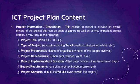Then, project proponents — usually just the school. Project beneficiaries — who do you want to help: the urban poor, women, youth, students, out-of-school youth, etc. Date of implementation and duration — probably the entire second semester of this school year. Budget requirement — include this even if it seems like just a subject project, because using the internet, electricity, and your gadgets already constitutes a budget requirement. Project contacts — if you have contacts with local government units, SK, or your barangay, include them.